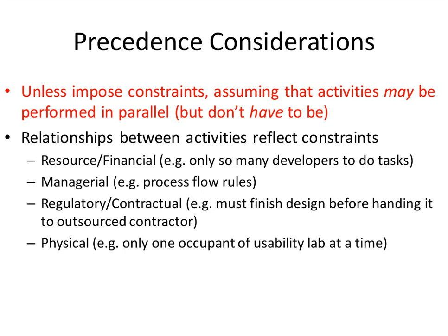So you cannot have the inspection of product A until A is developed, and potentially A goes through a debugging phase, perhaps. So A can't be debugged until it's developed, and A can't be inspected until both the debugging and development are done. So here we have a logical information dependency. This inspection depends on information from these earlier phases.